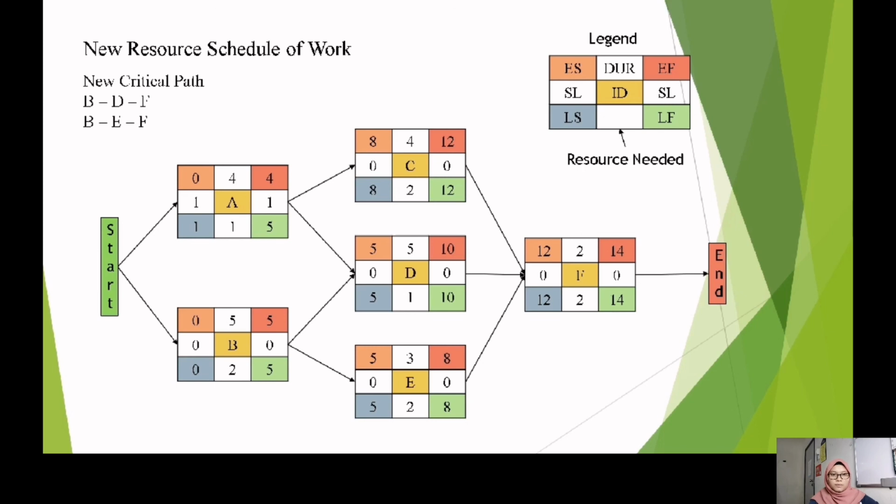First we put the early start and the late finish from ID A until ID F, and then we do the backward calculation from day 14 for all of the IDs, and then we compare back to the resource constrained schedule. We will have the same value for the slack. I think that's all from us. Thank you.